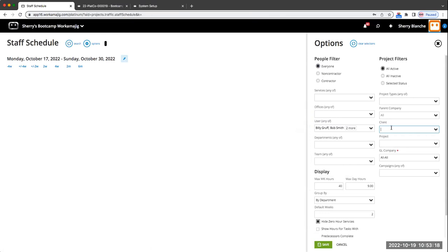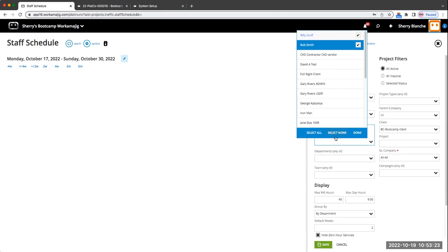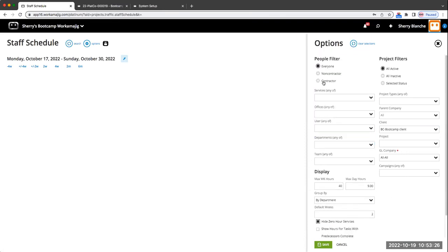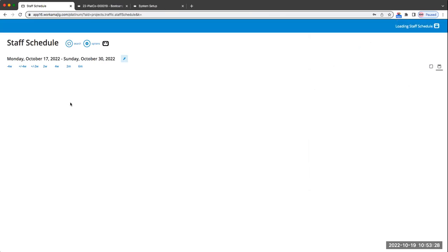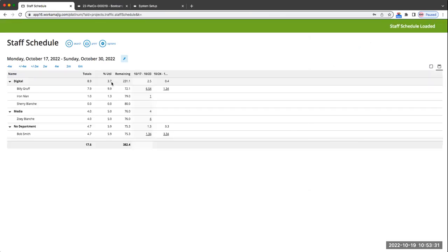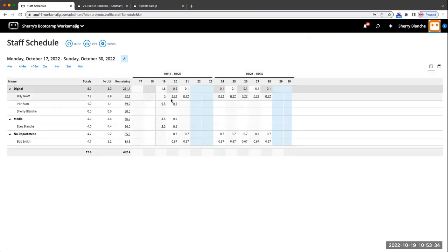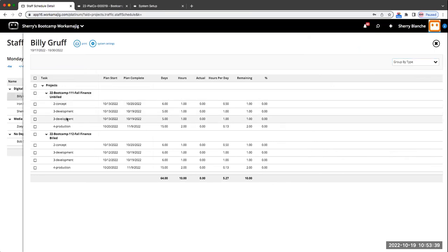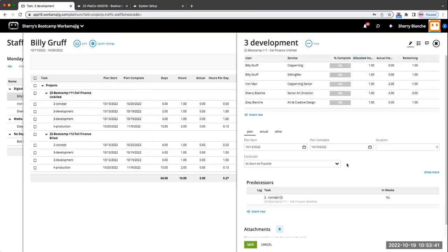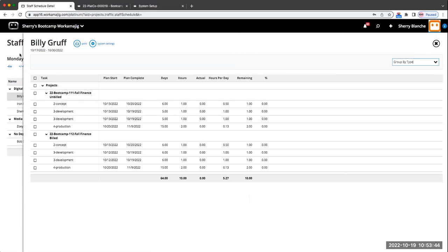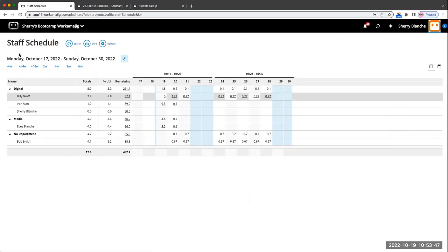I want to try and do my one client maybe only, and I'm still only going to see my resourcing based on hours and what I've resourced in that schedule, or if I have bucketed hours. So I won't see the deliverable really in here, because this is just how long do I expect for review and create and edit. So this will still be coming from your schedule and from your allocated hours for those tasks.